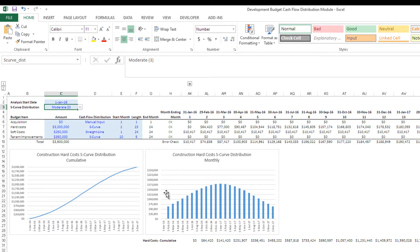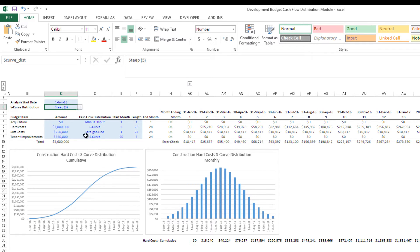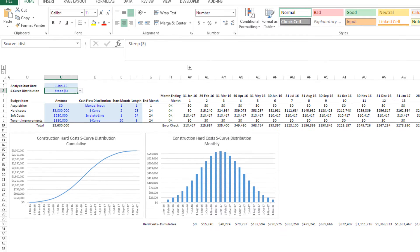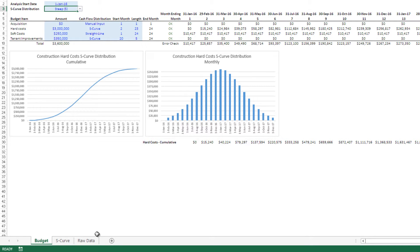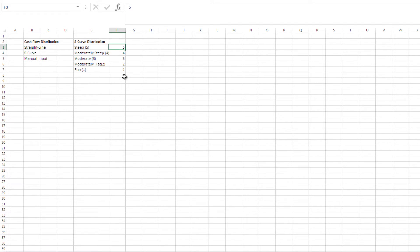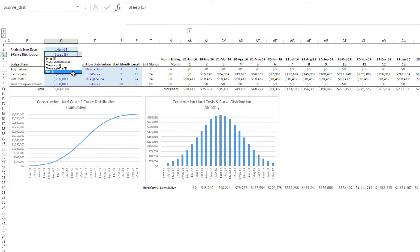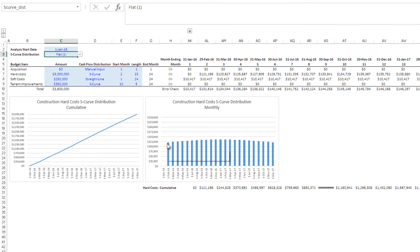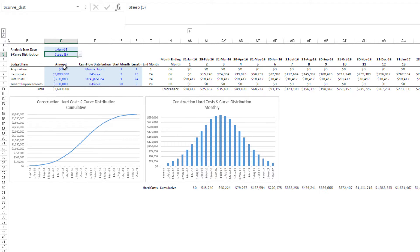With a moderate setting you'll notice we spend more in the early periods and less in the middle. For this exercise I'm going to keep it steep. You can come into the raw data tab and change the standard deviations — the higher it is, the steeper the curve; the lower it is, the flatter. If you go to flat — a 1 — it's almost straight line. You may have budget line items that are almost straight line but want a little S-curve, and in that case you'd use flat. But here we're going to use steep.